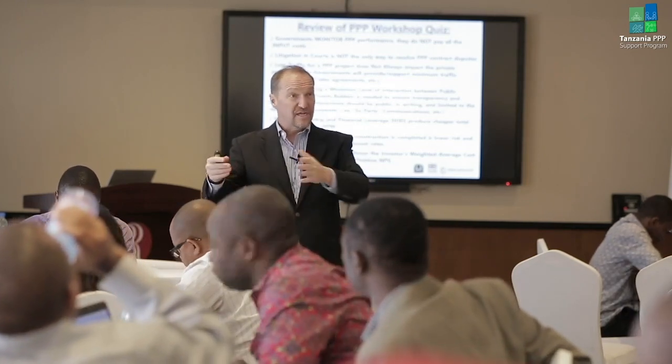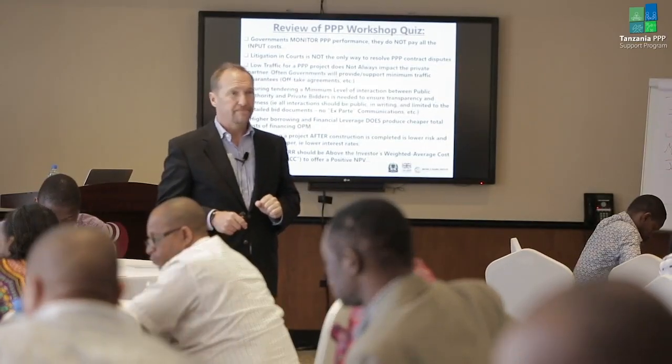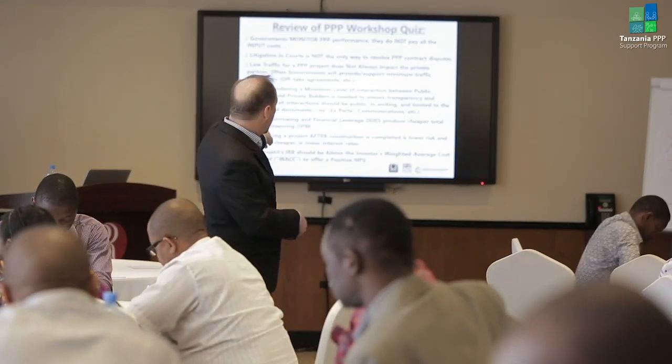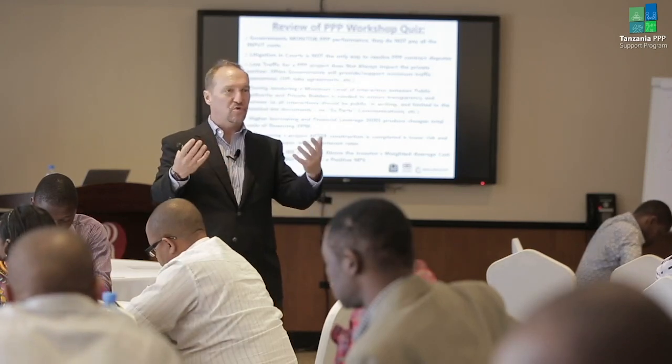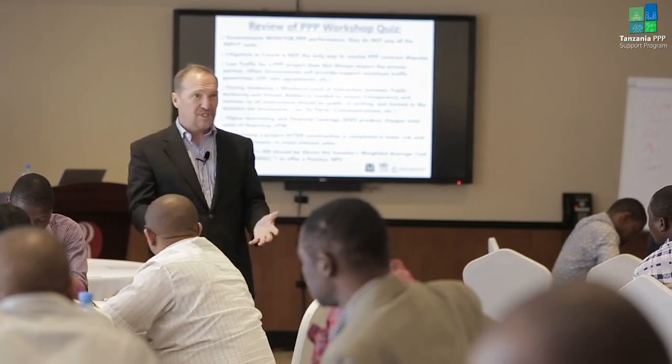The loan agreement says you will get paid before the equity investor, so you're taking lower risk. Your interest rate will be lower than the rate of return on equity. Anyway, the principle here is that if you allow projects to be financed with debt, you're going to end up with cheaper total costs of financing compared to if you required it all to be equity.